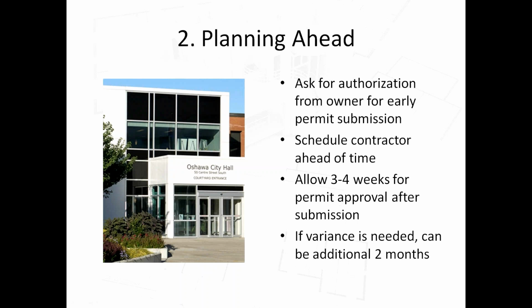Right, you're not going to know 100% in terms of the scope of work. But generally speaking, if your architect or designer has a good handle on what needs to be done, you're going to be about 80 to 90% there on what the city requires, and then the 10 to 20% is something that you can fill in after the permit has been approved.